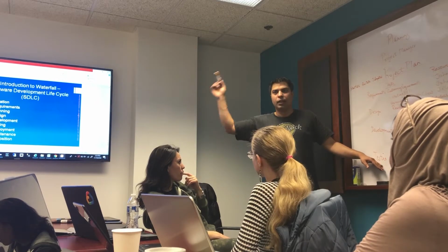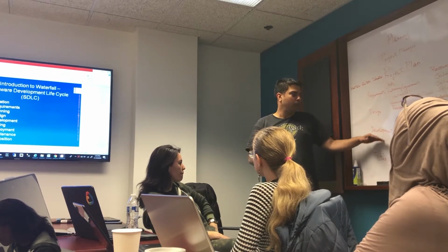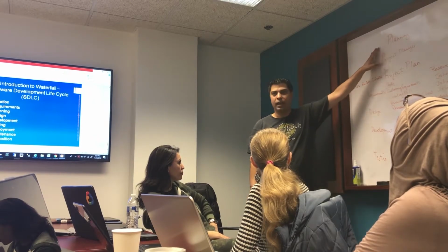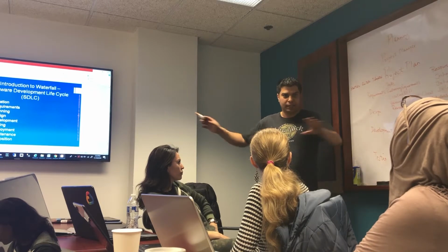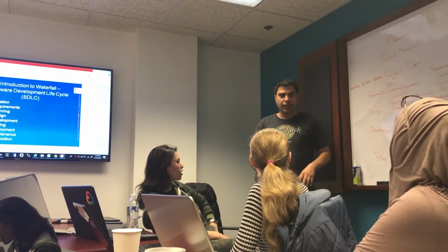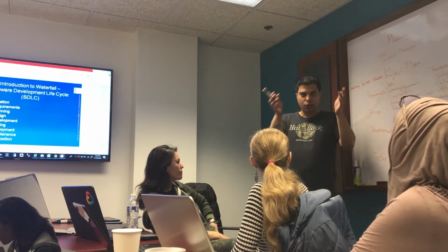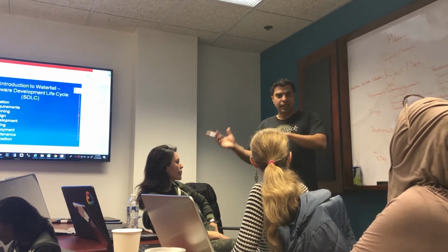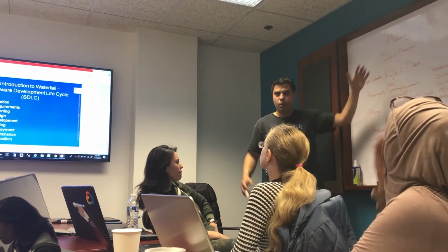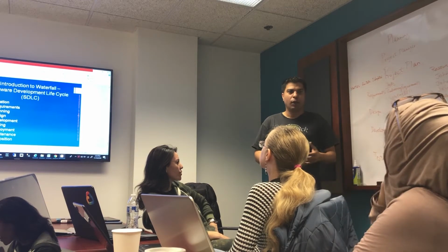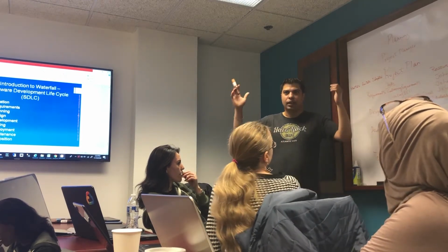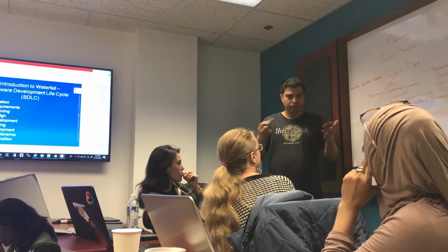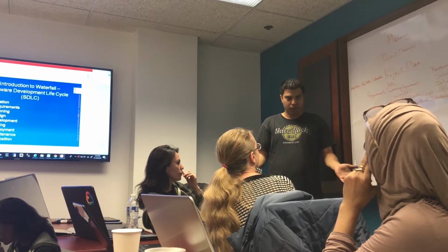The testing manager. So the testing manager, development manager, design manager, and requirements manager, during the planning phase, distribute the tasks in the team, discuss the tasks with the team, that you are responsible for this, and once that is done, send all this to the project manager. The project manager consolidates all of it in one project plan so that they know what needs to be done to build the Bank of America web application.